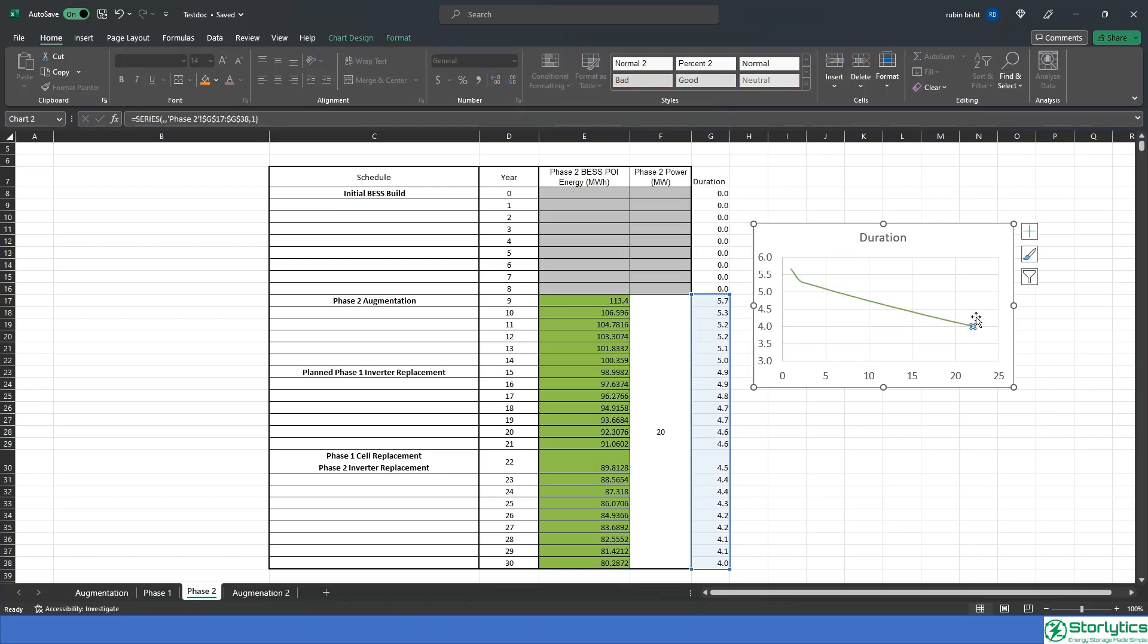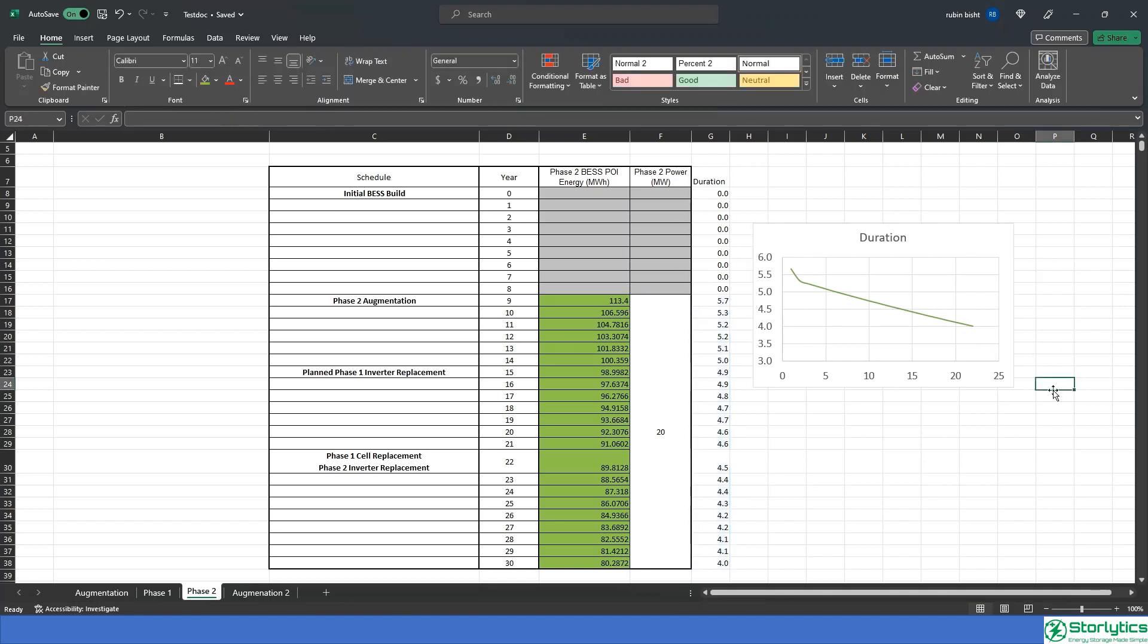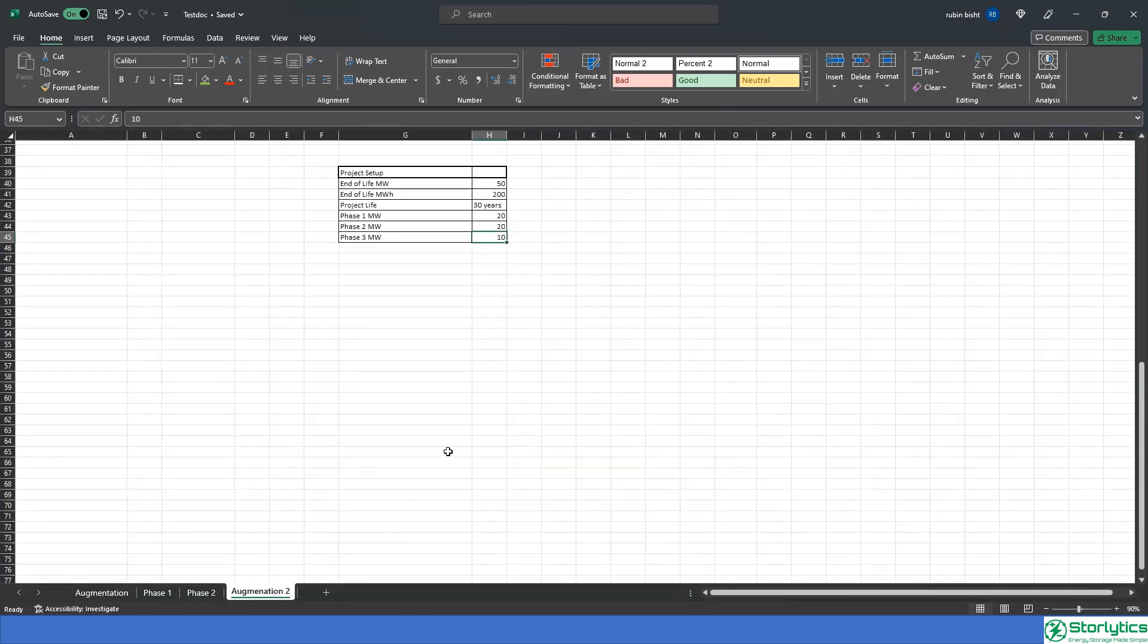If we look at the degradation, we can align phase one battery energy storage system cell replacement with inverter replacement. This can potentially save owners on planned downtimes and having to allocate personnel to work on the plant for equipment replacement.